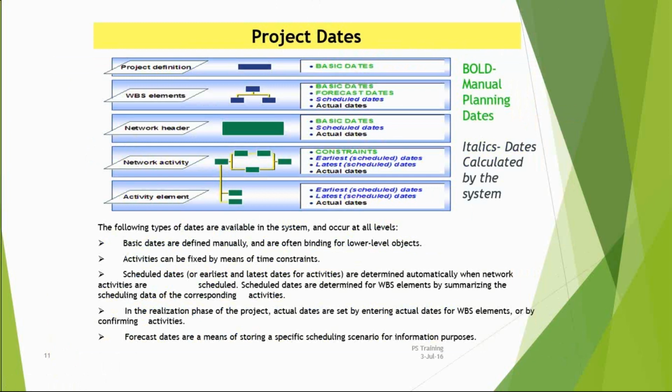Again, it is pure project management terminology. It comes in PERT and CPM. As I told you, PS completely works on PERT and CPM, which is a part of operation management. So why do I need to calculate my floats? Because whenever my task gets delayed, obviously the dependent task will get disturbed. So I need to calculate the time float, where I can have the flexibility to play within the time and take my project back to the track.